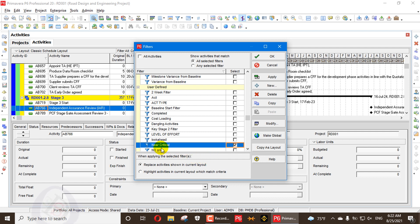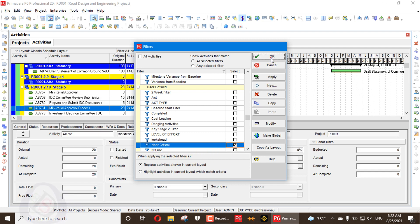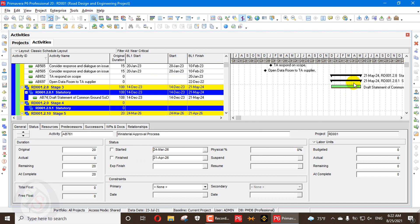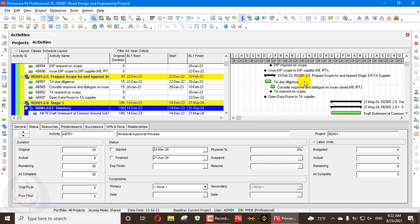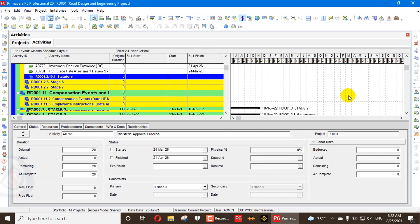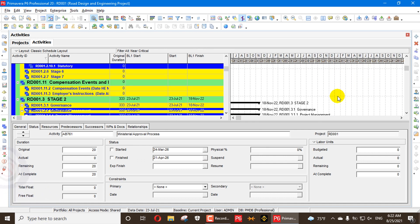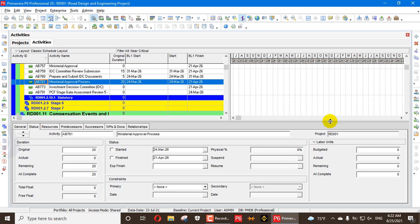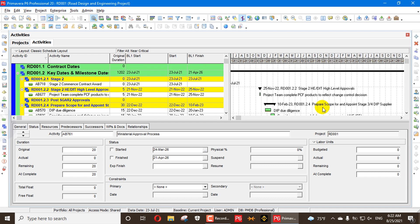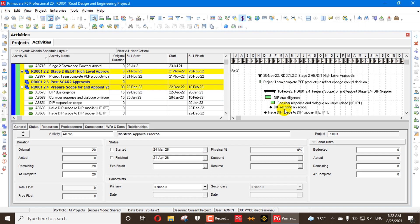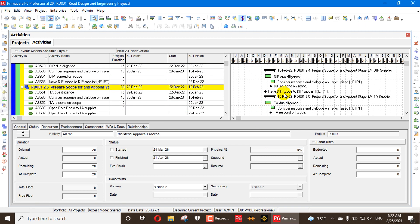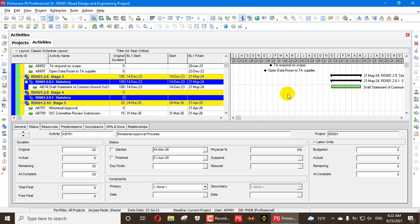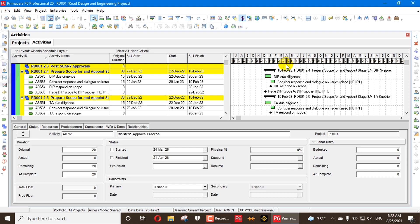When we apply the near critical activity filter and press OK, these activities are shown in a green bar. These activities are not critical, but the activities shown in the green bar are near critical.